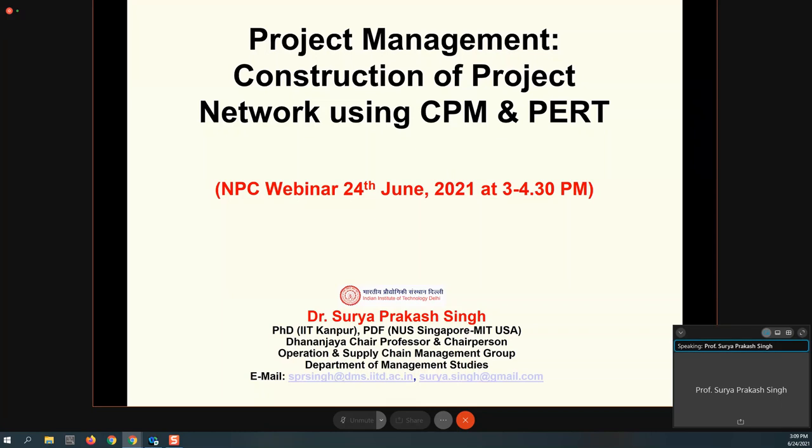Below that you cannot complete. And what are the various critical activities? Critical means the important activities in that project that have to be taken care of. If we don't take care of them, the project completion time will increase. These are the two things answered by CPM. The moment they knew the minimum time to complete the project and the critical activities, they could schedule the work accordingly, knowing that first this activity has to be started, finished, and then so on. All this information was required at that time, and it was provided by the CPM method.